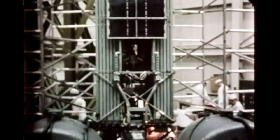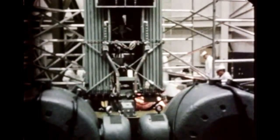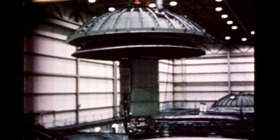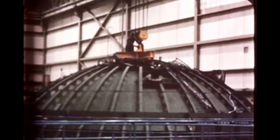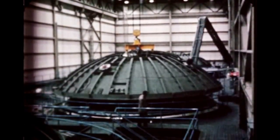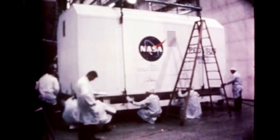Fairchild Hiller completed fabrication of Pegasus A for SA-9 at Hagerstown, Maryland, early this quarter. Following assembly and functional tests, the unit was then shipped to General Electric, Valley Forge, Pennsylvania in December. There, it was subjected to low-level vibration and shake tests. Later, the unit was moved into a vacuum test chamber for systems checkout and electric component testing. Following satisfactory testing, the spacecraft was packaged and shipped to Cape Kennedy December 29th. It was taken to Hangar D, where checkout has begun.